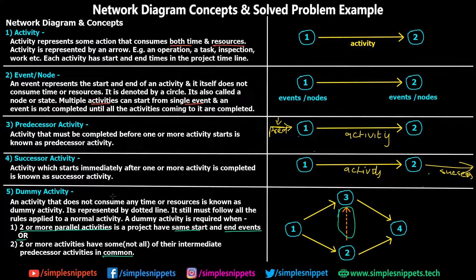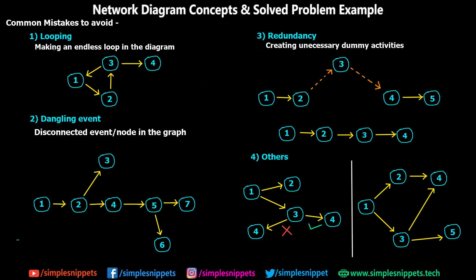Now let's move on to some common errors students make when solving network diagram numericals. The first mistake is Looping — making an endless loop in a diagram is not allowed. For example, going from node 3 to 1, 1 to 2, and 2 to 3 creates a loop, and this is something that is not allowed.